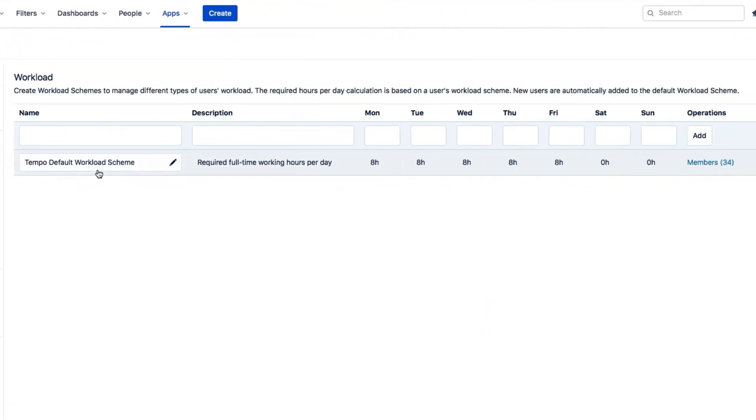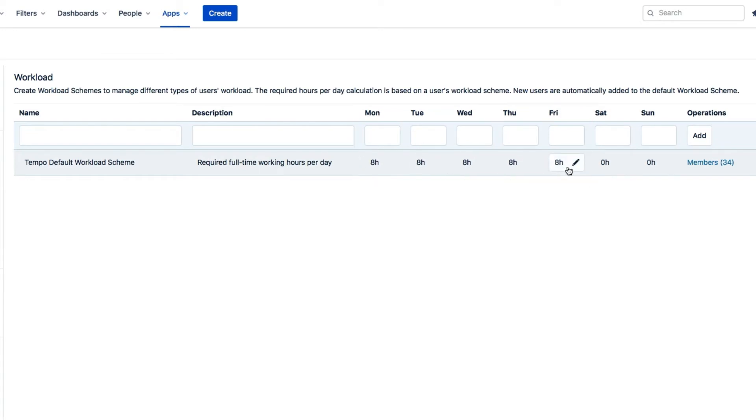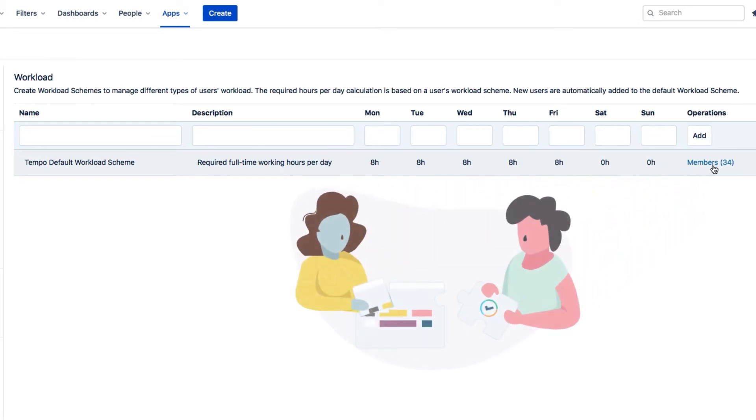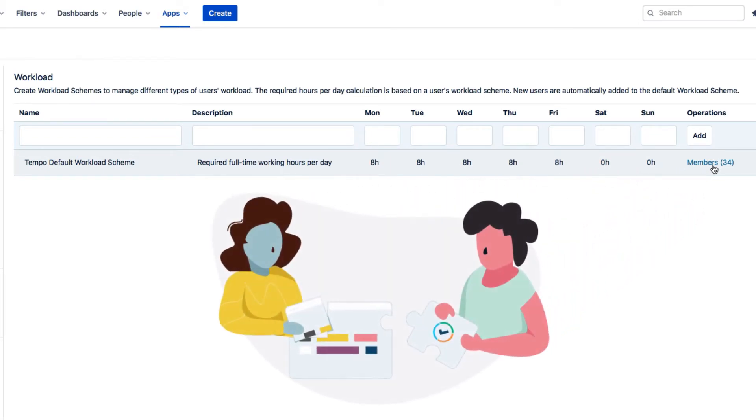The default Tempo workload scheme has 8 working hours each day from Monday to Friday, adding up to 40 hours per week. All employees are assigned to this scheme, including new users who are added to using Tempo. So, if this default scheme is good enough for your company, your work here is done.